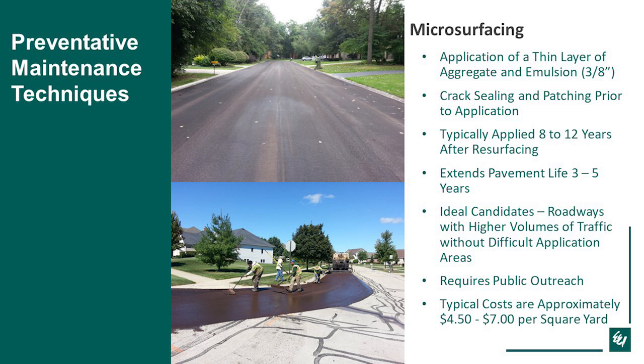It's also important to do a little public outreach on this, mostly because of the sand, just so people realize why the sand is there. It will be vacuumed up the day after, but people will drive over it, so it's important to have a little public outreach. It typically costs between $4.50 and $7 per square yard.